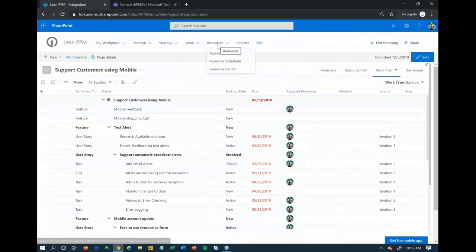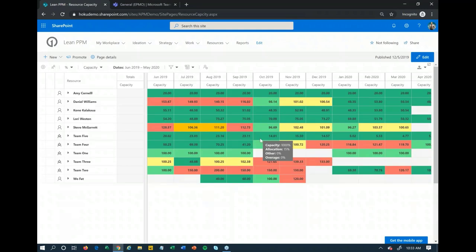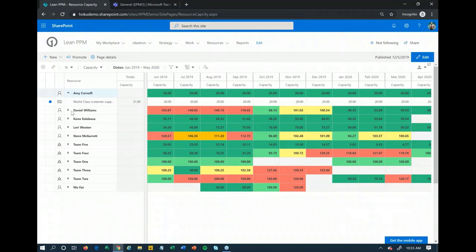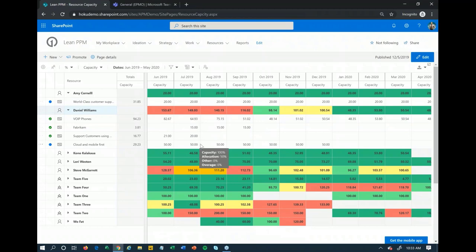On top of all that, you can also look at resource capacity. If I'm more of a resource manager role in our organization, I can come in and see which resources are working on what, who's over-allocated, who's not — regardless of what methodology you're executing on. As long as we're keeping those high-level resource capacity plans relatively up to date, we can get a better picture of who's working on what, what's upcoming, and who's over-allocated in any particular period. For example, Daniel Williams is over-allocated in the first four months because he has four different projects going on at the same time. I can drag and drop to move things around and make adjustments from here as needed.